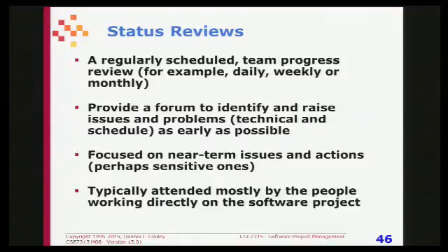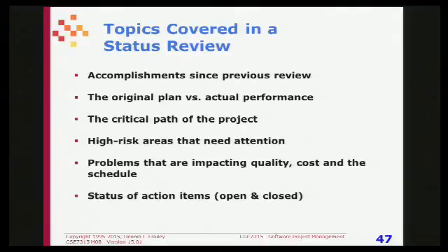Status reviews are scheduled on the calendar on a regular basis, once a week, once a month, once a day. And they tend to identify near-term issues. We're having trouble with this. We need to change something here. And these are the kinds of topics you would cover at a status review.